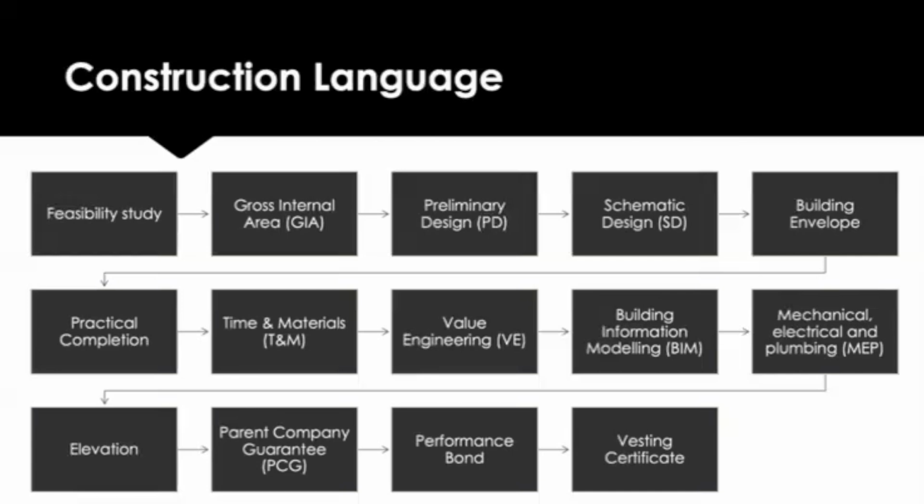Quite a common term we hear in construction is value engineering, or VE. This happens when we want to evaluate the construction methods and/or the materials to determine whether or not the net result could be better by reducing the cost, but keeping the performance, reliability, etc. the same. So it is about making sure you've got consistency with specific performance, reliability, maintainability, aesthetics, safety and security criteria.